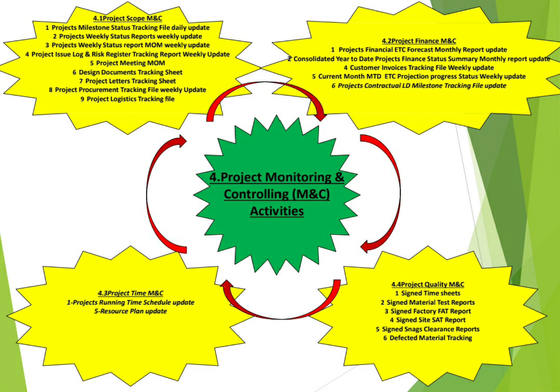Next, it is the project's weekly status report. For every project, there should be a project weekly status report, with a template agreed with your customer, where you will put all the necessary information of the project. For example, in design, the documentation status; for engineering, the engineering progress; for procurement, what percentage of the procurement you reached, and so on.